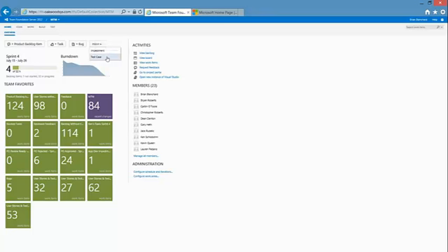There is a CMMI process template that comes out with Team Foundation Server as well, and that's a little more in line with that methodology. You get terminology and work items for things like requirements. You get things like your risks and your issues and all of the things that you would normally see in your project plan. And it's also worth noting, if that's your arena, you can tie Team Foundation Server directly to Project Server, and you can have a bidirectional data pump. So I could be in that environment. I could set up a project plan, tie that to a team project, define my high-level requirements within Project Server, and I can push it over to Team Foundation Server to let my development team do the work breakout structure. That's wonderful. That's a really great approach.